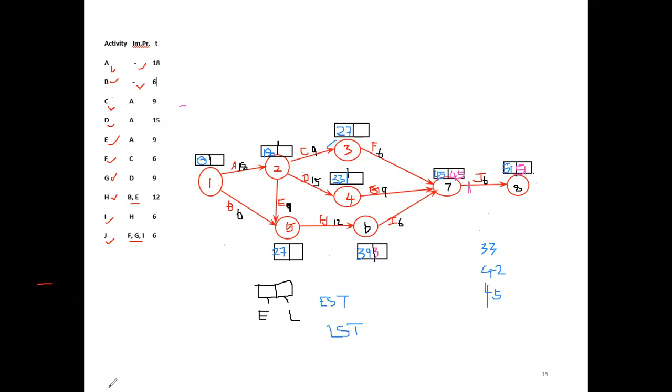Madam, can you please tell again how to find the critical path? Okay. Now you all understand how to find the total completion time by computing. Do the forward pass computation from event 1 to 8. Every time an event finishes, the next activity starts, and it will bring to 51. Are you clear? So 51 is the total completion time, and EST and LST will be the same. So we assign the 51 here as the latest start time.